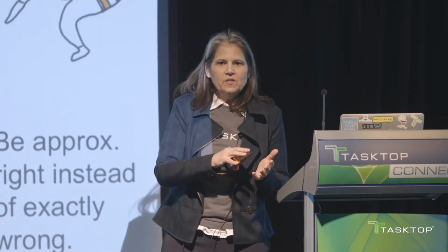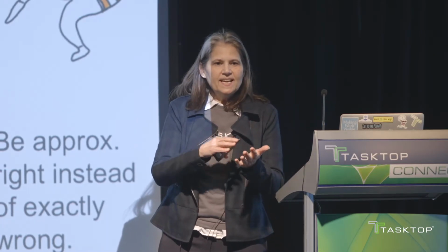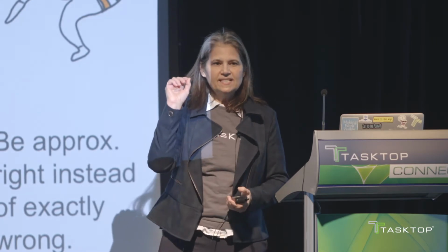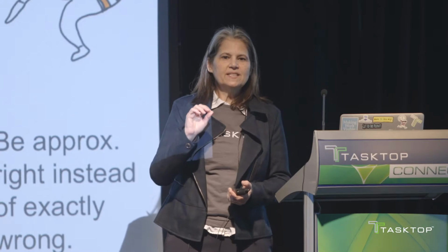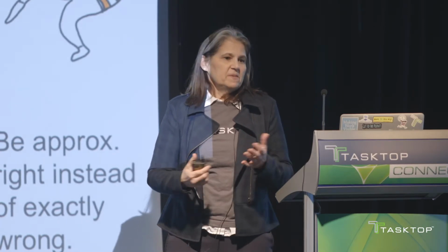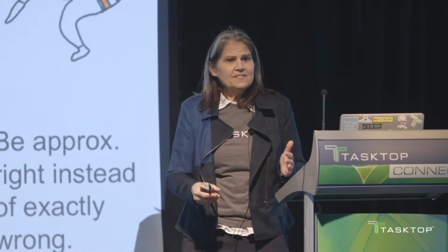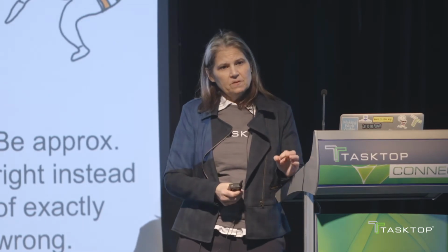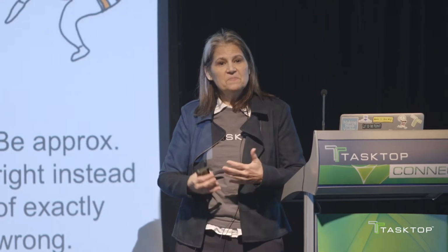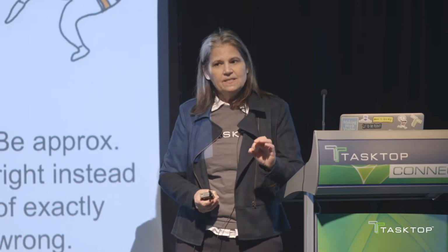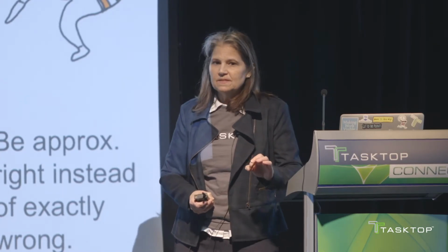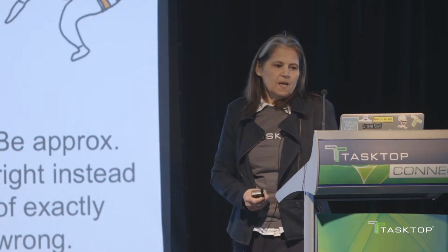What I was used to in the past was people would set an estimate and then they would set a date. We shall meet this date. We're going to deliver this work by this date. And we frequently miss the date. So that's a deterministic approach. We're trying to take a more probabilistic approach, saying, what's the probability of meeting this time frame? We're trying to be approximately right instead of exactly wrong, with probability.